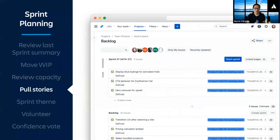Now that we know how much work we can reasonably get done, we can start pulling stories into the sprint. The product owner brings a prioritized list of stories that meets our definition of ready, and the development team determines how many to pull in and commit to delivering.